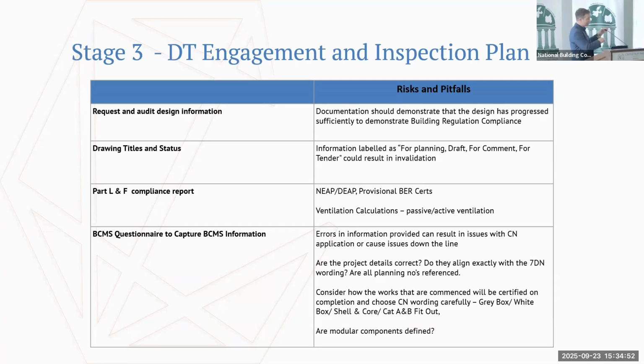It's important to flag that here from our perspective, so that we know that down the line that certification gap needs to be filled. Who are we going to be chasing for an ancillary cert, or is it going to be a specialist engaged by a subcontractor? So we try and define it at this stage as early as we can.